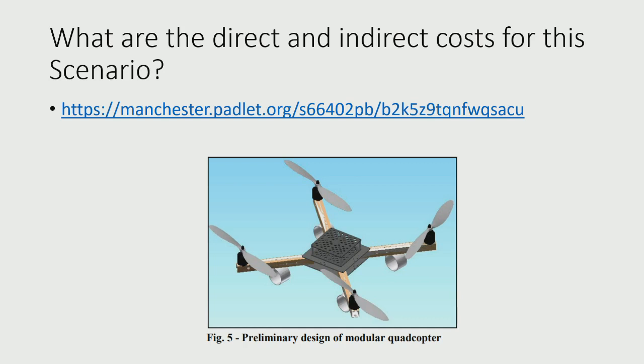There are grey areas around the edges where accountancy has tried to allocate overhead more precisely. But in general, in principle, you've got your direct labour, direct materials, and then you've got your supporting stuff. And you allocate it usually on the basis of labour hours. So if you've got lots of labour in your project, you attract lots of overhead from the organisation to pay for everything, which, you know, you can imagine is quite an inaccurate way of doing things.